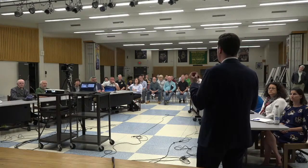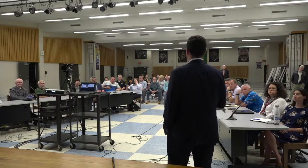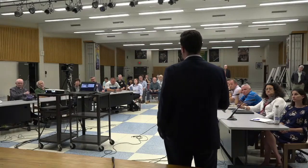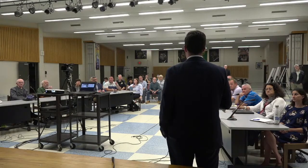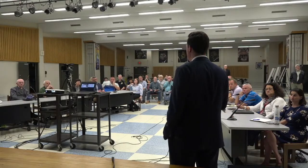space. And some of you might say, well, why do we have to do the electric? Well, the new energy code, most likely you're going to be looking at all electric HVAC systems. That's the way it's going. So you're going to need to bring in a new electrical system, new branch work, new sub panels. All this stuff starts to really become a quick snowball effect.